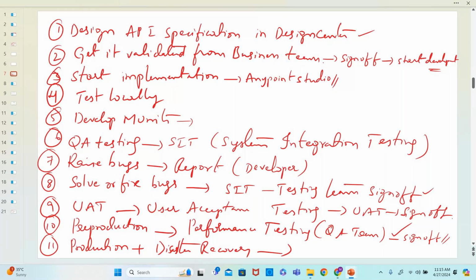Sorry for that. Now, there will be a separate process; each and any organization will have their different set of process before going to production. Maybe there will be a discussion like when to go for it. There will be a separate team for deployment. Exactly. But all those necessary things should be provided by you, and your team lead will be helping you. What are those? UAT sign off, SIT sign off, this PT sign off, all these emails, and the code property files configuration for production. All those details have to be kept clearly ready, and then you need to present.